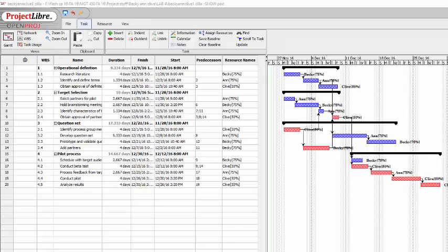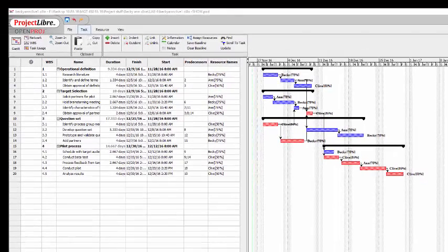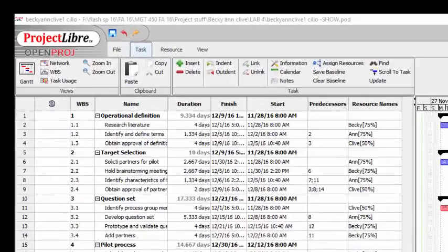All of the durations have been entered, something the program should have done automatically. Look at the chart. It is now several days longer. Each one of these persons worked less than full time. So to do 1 hour's work, they had to do more than 1 hour's worth of work.